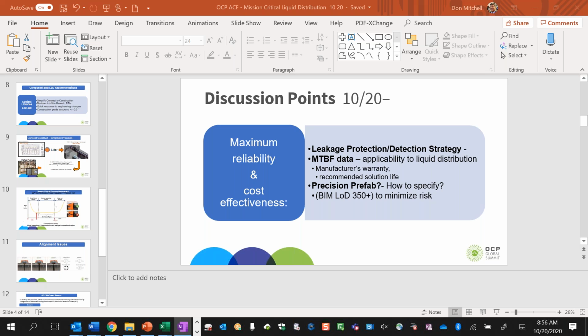a couple pounds, because the thing could be sitting out on the cold dock or a warm day. But we try and take the temperature in the same. In other words, we specify factory loaded at 70 degrees Fahrenheit, whatever it is. That'd be part of the checklist. A couple pounds of pressure is always your criterion. Okay. Yeah, thank you. Exactly. Because most of that having to do with ambient influence on it. Okay.